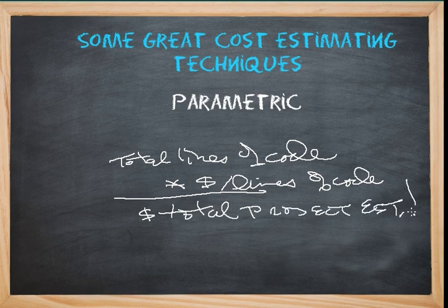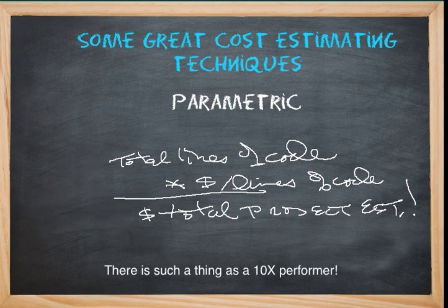Hogwash. There's no way. There's some pretty big gotchas with this approach. To come up with a qualified model, however, you need to factor in the skill level of the development staff, which needs to examine the 10x multiplier that states the best engineers may be as much as 10 times more effective, more productive than others. So this has tremendous risk associated with cost estimating, especially in how you would assign the cost.